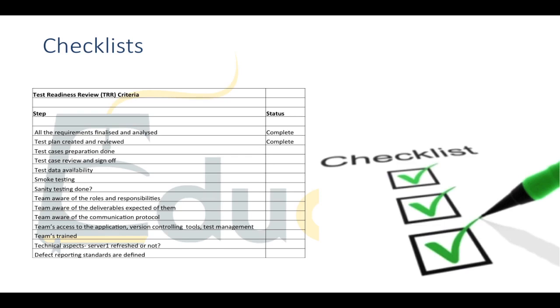Now the team have to be aware of their roles and responsibilities. The last thing you want to do is 7 days into a particular test set realise that you've had two guys running exactly the same tests and they didn't even know about it. It does happen. Sometimes it's intentional, i.e. the users realise what they're doing and they both want to do it to check each other's work. Or it could be completely unintentional, totally harmless. They may both pick up the same job sheet and end up working through the same test cases and wasting 7 days' work.